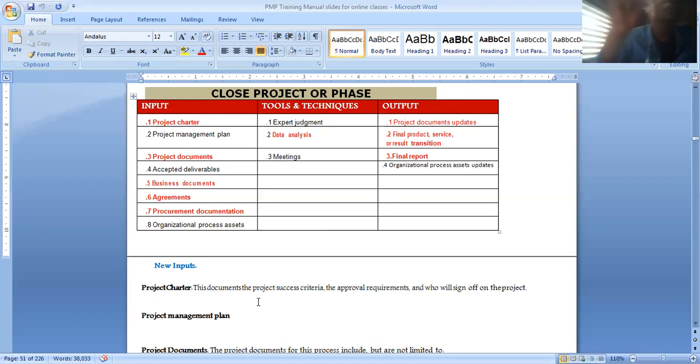Yes, and that's what we told the other time: how do you close a project? You close a project by going to see your lessons learned. All what I have learned on this project, you archive it in your repository for future use. Like what this man is teaching us about how the styles are cut, the sizes and everything. Yes, so that's unique knowledge, because if we don't have this, we can be cheated.